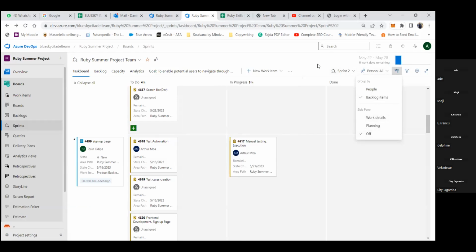Okay, so once you come here, after you, like I said, move stories into the sprint, it's just to remind them to create their tasks. If they don't know how to create it, you have to coach them on how to do it, and then estimate, like I said, in hours based on their capacity. And if they say, but haven't we done an estimation before? That estimation is done in story points. This one they are doing now, a task, is saying that this is a particular activity that I'm going to carry out against that story.